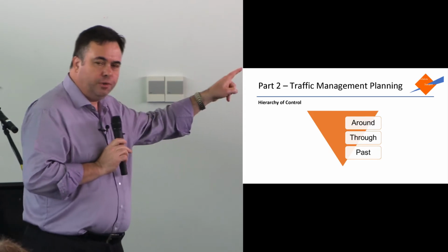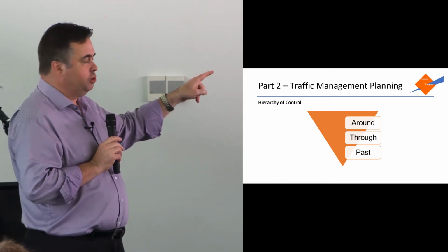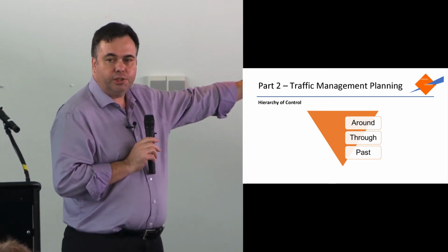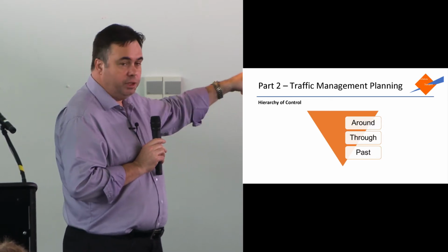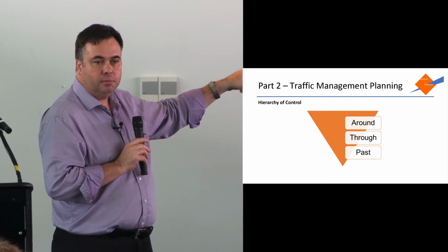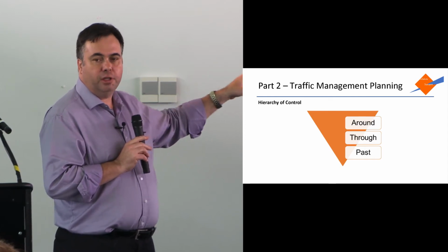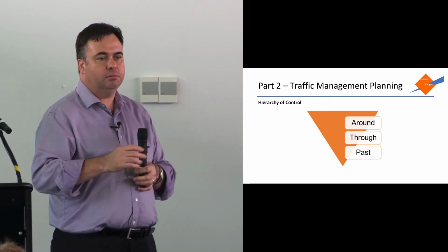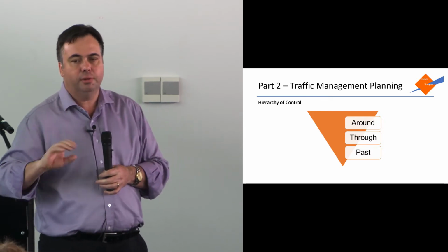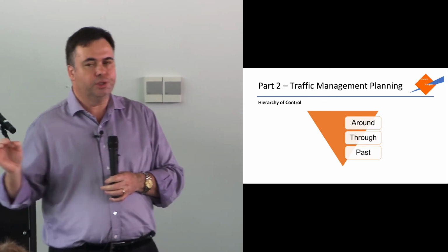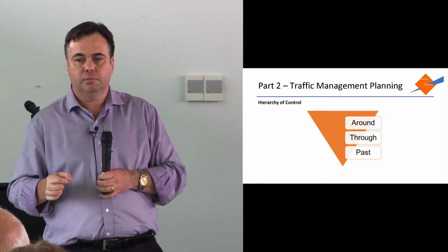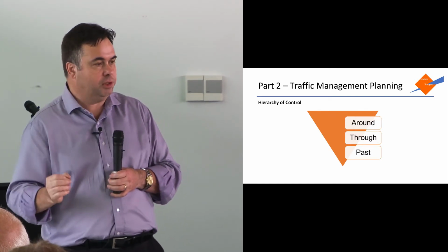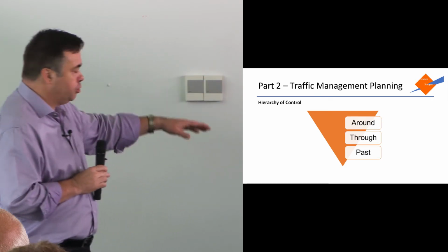But for all of your sites in traffic management planning, what you need to do is think about this process. The safest way to deal with the hazard or deal with the risk is to eliminate it. And if you can't show that you've at least considered it, don't just put, it's too inconvenient. No, that's not the answer. Have a real considered story. Convince me that it's not practical. Don't just tell me it's not, convince me it's not. So you need to step through that hierarchy.